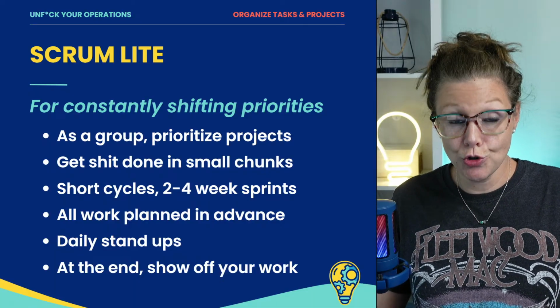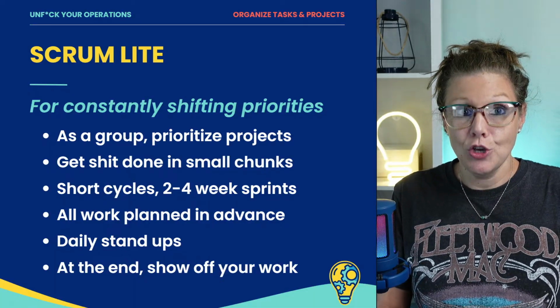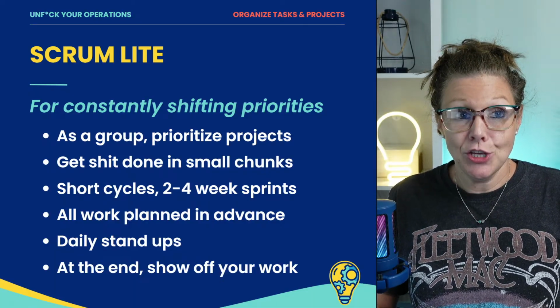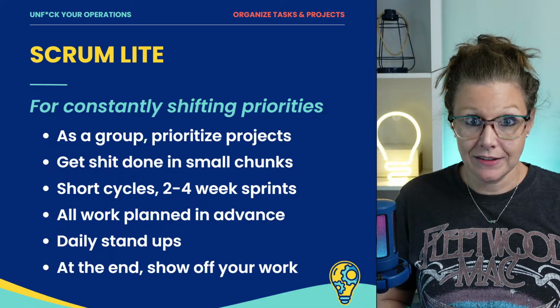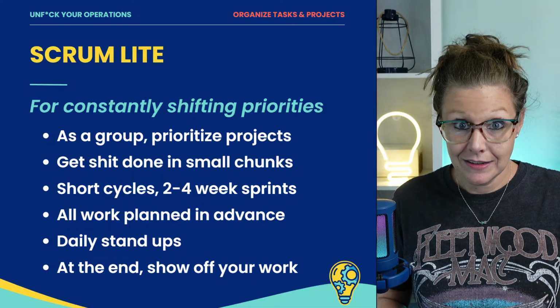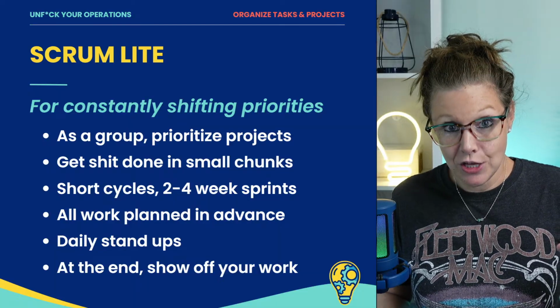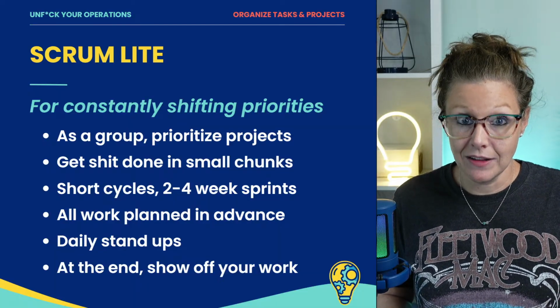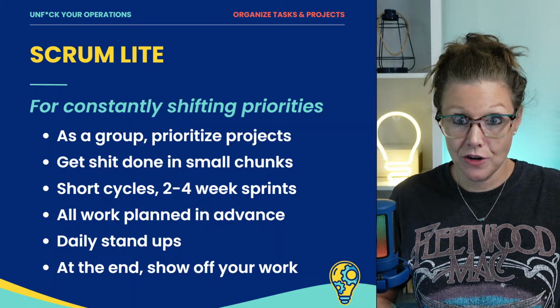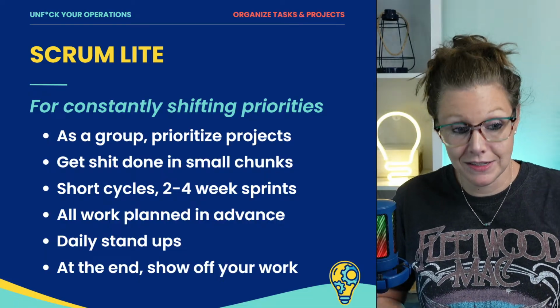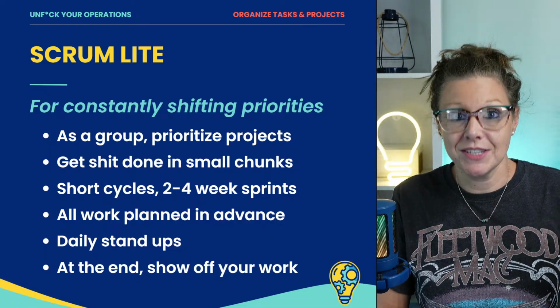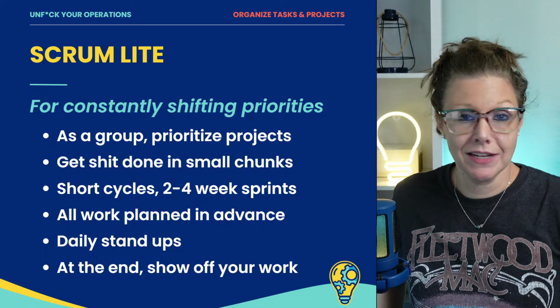In true Scrum, you plan for 2 weeks and do not add anything else to your plate. You lock it in, put on blinders, and if anything else comes up, you put it into your backlog, your collection of things to pull from next time, and you assess it in your next 2-week cycle.